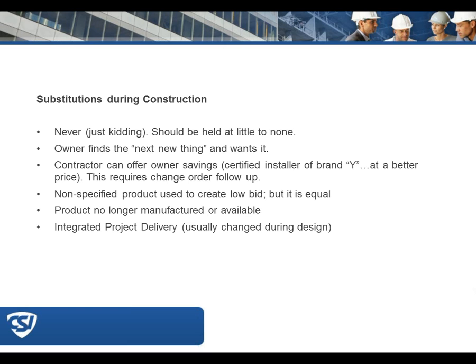Real quick comment. Jim mentioned change orders here, so I just wanted to say quickly, when you are accepting a substitution, you are technically changing the requirements of the contract documents. Pre-bid, it's done with the addendum, because the addendum becomes part of the contract documents. Post-bid, it's done by change order. So it's not just a matter of signing off on the substitution request form. It needs to be incorporated into contract documents by a change order. Right.